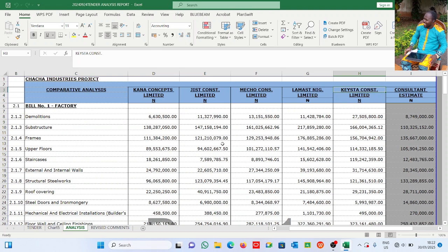Alright, so basically we'll go right in. Upon receipt of tender, whether from contractors or from suppliers, whether you're a consultant QS or a contractor QS, this is at your desk. Upon receipt of tenders, maybe from your subcontractors, your specialist contractors, or as a consultant QS receiving tenders from contractors, the first thing is to check for arithmetic errors. Very, very important. I'll tell you why.